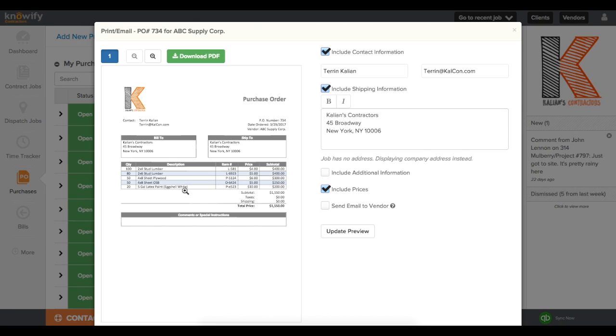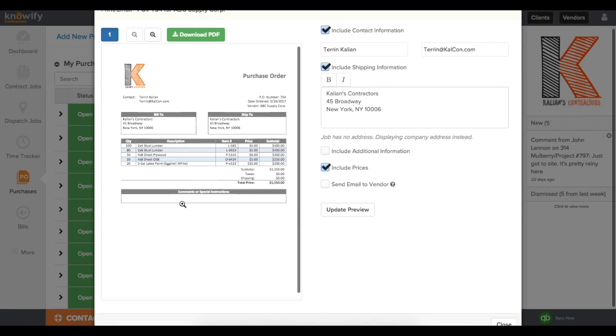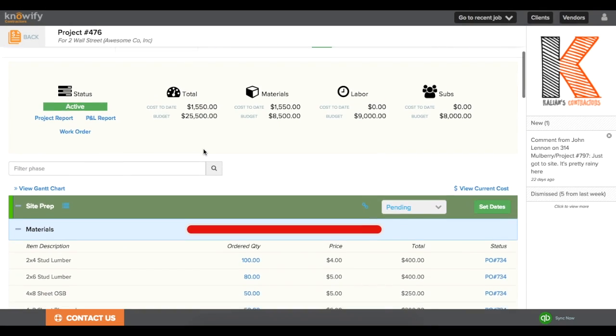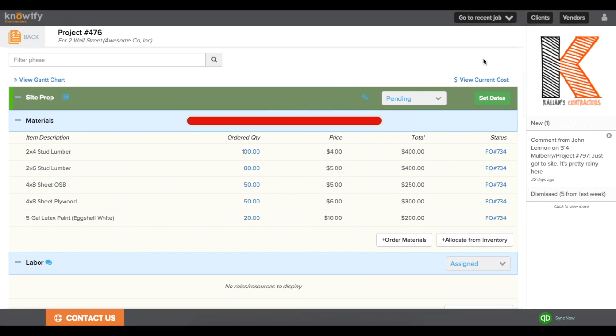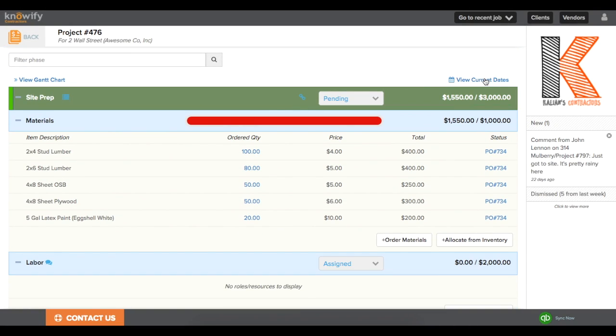So again, if you're doing your takeoff in another software, you can still get all of the automation through Knowify. And back in your project plan, you'll be able to see how much you spent using that purchase order versus the budget that you also imported through your spreadsheet.